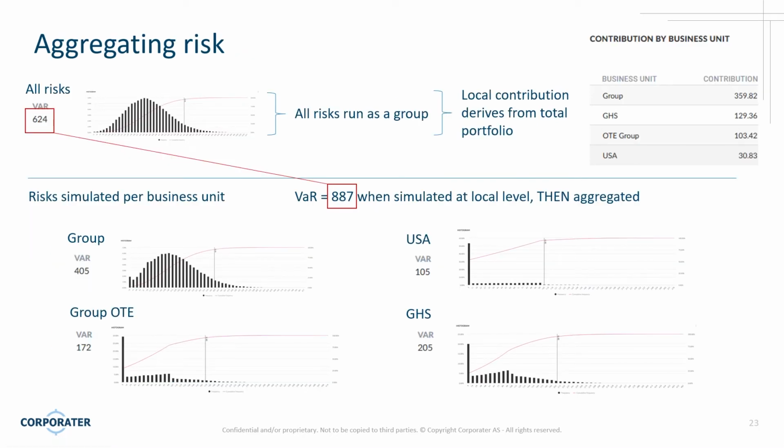So moving back to the risk world. We're moving away from dice for a minute. I just want to talk about why this is the best way to aggregate value at risk: you do it for the entire organization, and then you break it down by business units. And this might seem counterintuitive because it actually is backwards to how most aggregations work. If you are aggregating revenue, for instance, you roll it up. You start at the lower business units. That's where you have your data, and you roll it up to the top.